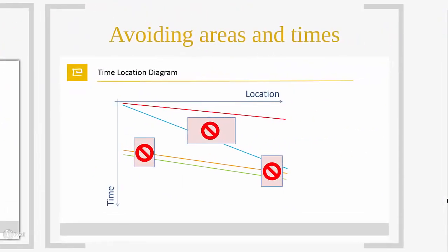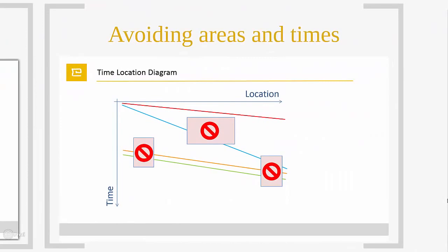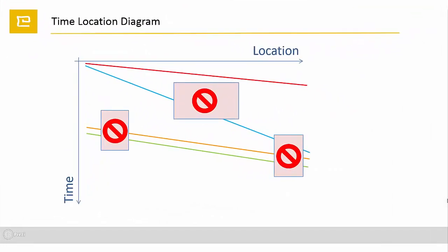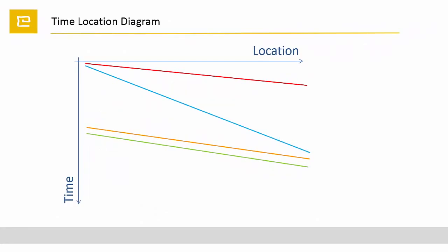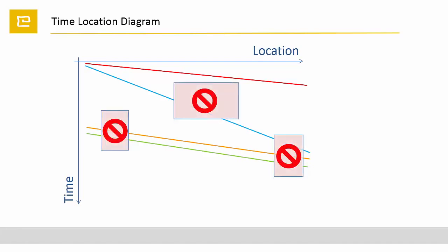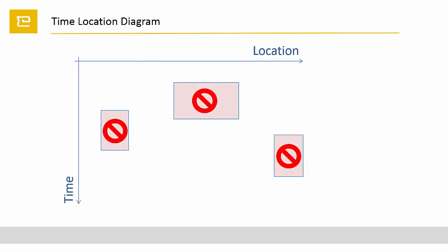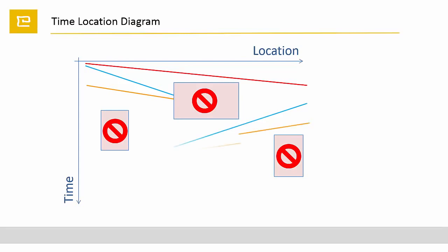The next sample is showing how to avoid areas due to legal restrictions, access rights, environmental protection or weather conditions. As you can see, just 4 linear activities are planned for this area. But what if you have no access on specific locations at specific times? How do you have to change the schedule? The clue is first locating the blockings, then fitting the task in the remaining place. Sometimes you have to cut the process and relocate the equipment, but in some cases there is an optimized schedule still very near to the original duration.